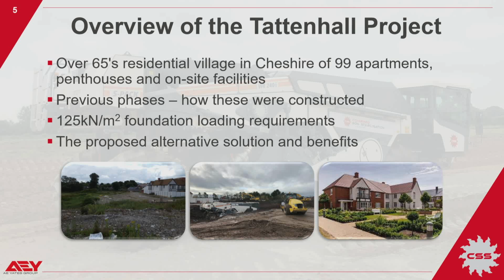The contractor, Seddons, were working with combined soil stabilisation on another project and inquired whether the lime modified option might be suitable for the subgrade to the structures, parking areas and the access roads. Earlier contract involvement, discussions and a site visit ensued, followed by CSSL producing a potential solution to remove the requirement of a piled or vibro stone column solution for phase 3.